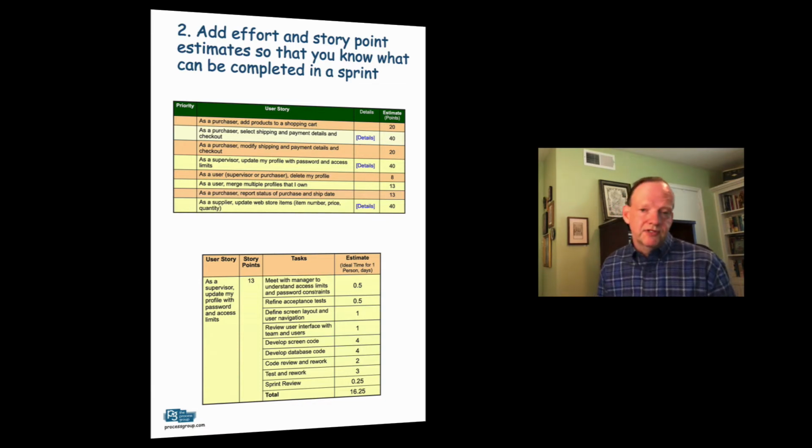With no estimates, then often people are scrambling around trying to get anything finished by the end of the sprint. And if they cannot, they roll the work to the next sprint, and therefore they avoid the feedback loop. So I think estimation is critical as a step you do in a team to verify that you can actually finish work by the end of the sprint and get a demo and the feedback. So estimation is really for the team to understand how to manage its work and know what amount of work you can do in every sprint.